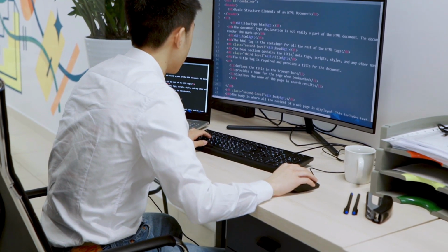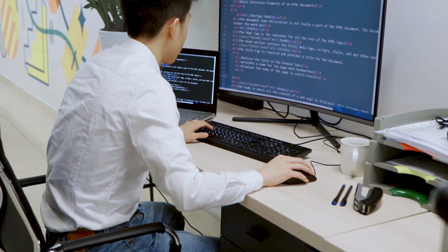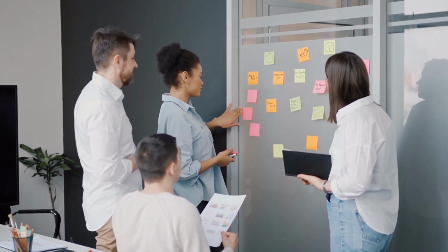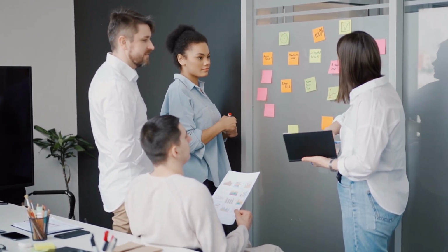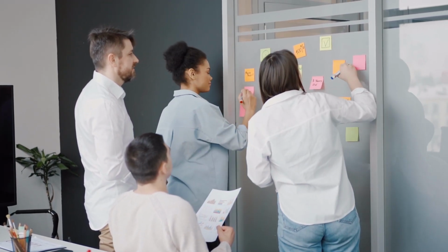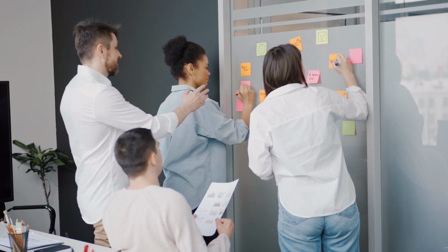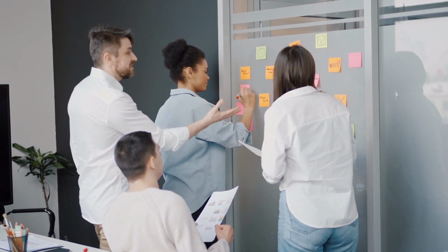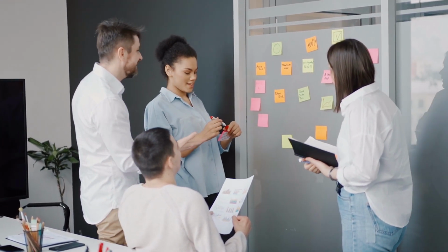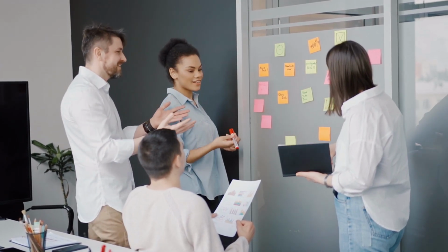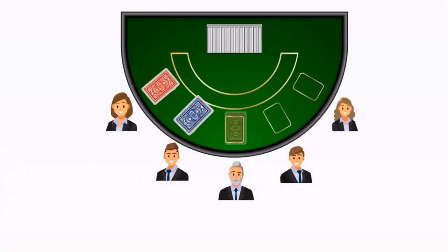Story points is a dimensionless value. It can be toys, elephants, earth, parrots, anything. The fact is that in order to evaluate the task, the developers who have gathered at planning poker ask about the reference tasks. For example, if the whole team has previously worked with the registration functionality, at planning poker the team considers the task of finalizing this functionality and, for example, estimates it at 2 story points.